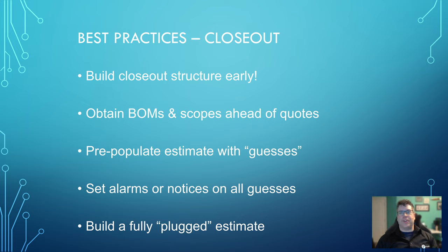Set alarms on any of your guesses. Any good software package will highlight for you when either a number's missing or let you highlight something as, like, okay, I've put a plug number in here. So when you're closing that estimate, you do a final quick run through. You can very quickly see what plug numbers do I have left? Am I comfortable with those? Okay, let's go.